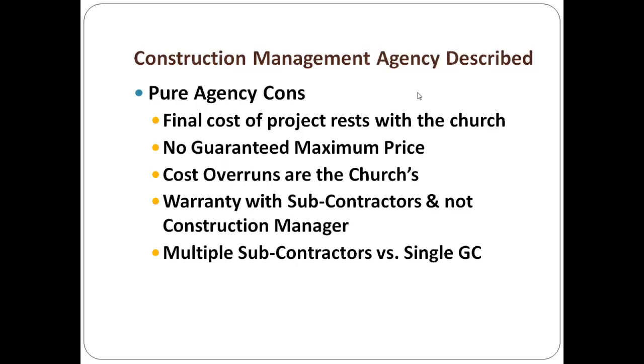But boy, I tell you, the potential is there for it, particularly if you have several not able to honor their contracts. There's a heavier workload on the church leaders. When you use construction management and the contracts are with all the subcontractors and suppliers, you're going to have a representative from the church readily available to make decisions as you go. It is arguably a negative. Is it's going to cause you to be more involved.